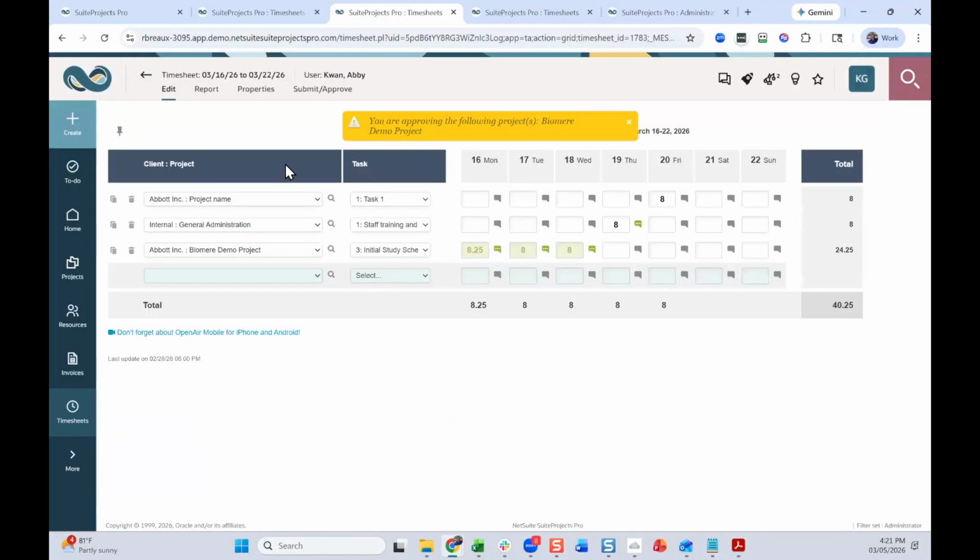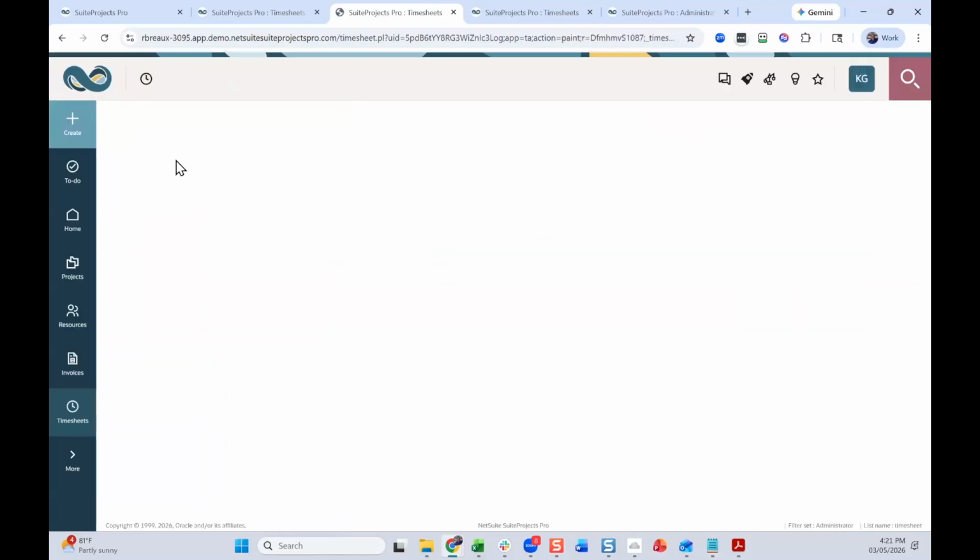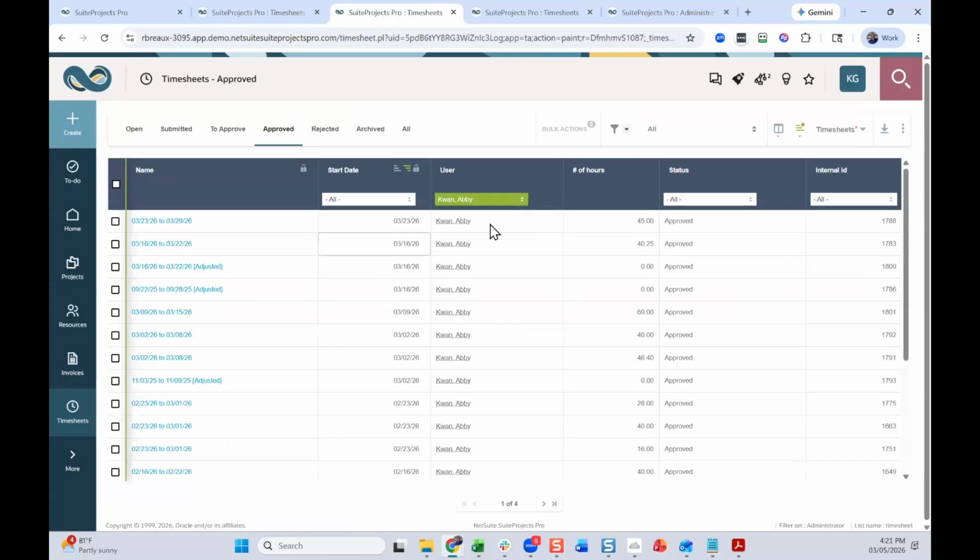Once you save it, you can go back to your list and you can see a list of timesheets and adjusted timesheets. You'll notice that they have a 0 balance because we have a +8 and -8. And when you run billing on those projects inside of this adjusted, you'll get negative charges on one and positive charges on the other. So adjusting a timesheet is the best way to correct time, especially if you're a T&M shop and you've done all your T&M billing